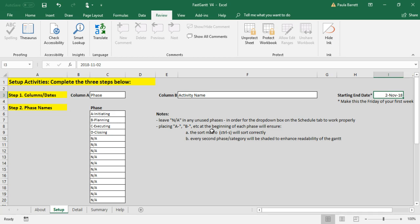FastGantt allows for 36 weeks of schedule, that's its maximum duration. But you need to tell it what the end of the first week is, so then it can calculate all of the other weeks. My recommendation is to make this a Friday, make the end of your weeks on Friday, though you can make it any day you like. So I've made the starting end date Friday, November 2nd, 2018.